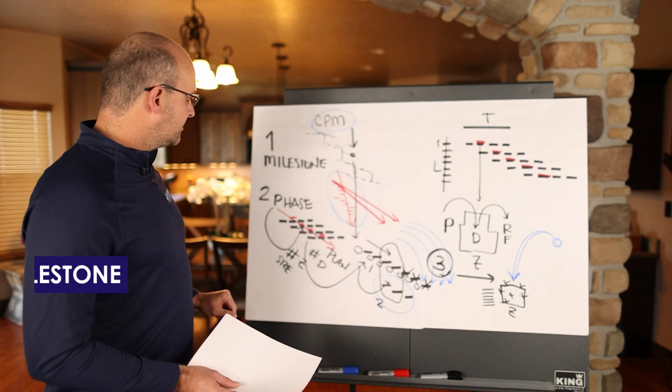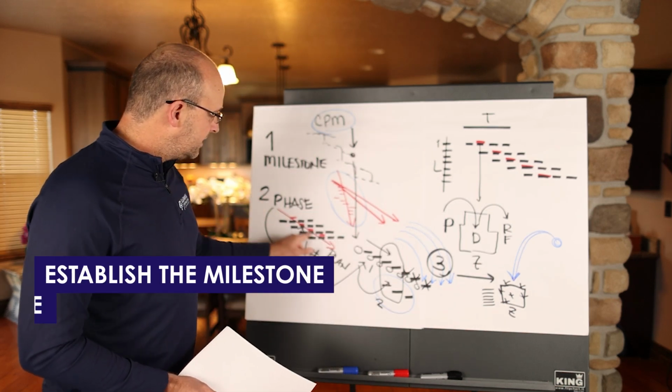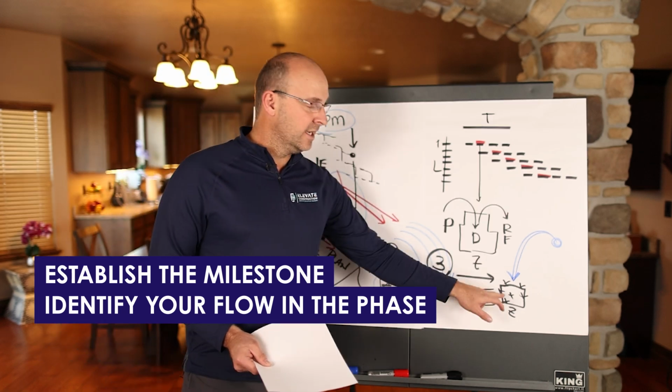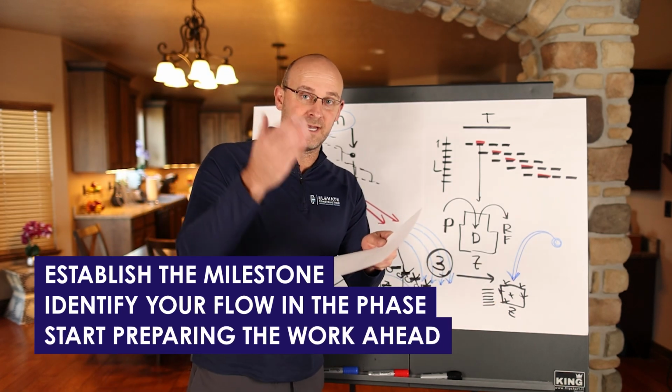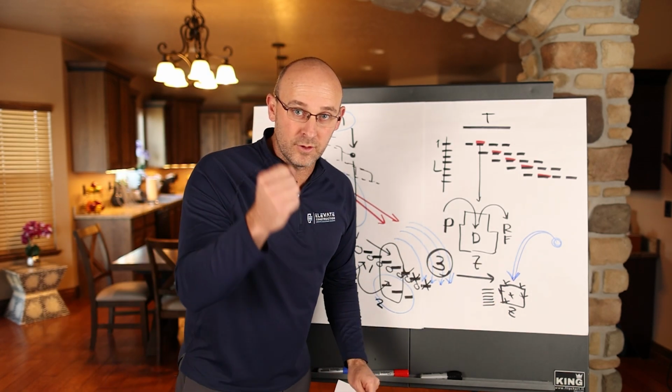Step 1, establish the milestone. Step 2, identify your flow in the phase. Step 3, start preparing the work ahead and asking for what you need, and hold the line.